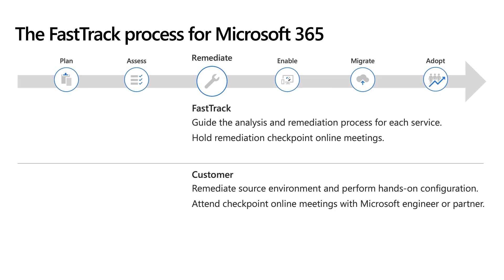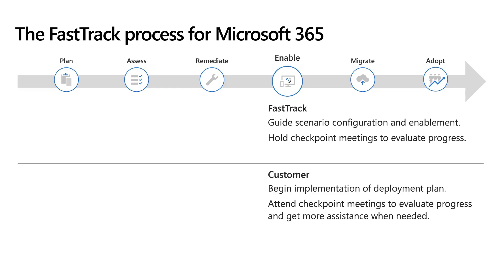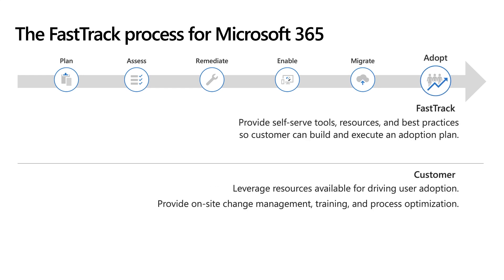During the remediation phase, FastTrack guides the analysis and remediation for each service and holds checkpoint meetings along the way, while customers remediate the source environment and perform hands-on configuration. In the enable phase, FastTrack guides scenario configuration and enablement, while customers begin implementing their deployment plan. During the migrate phase, FastTrack provides guidance to tenants with fewer than 500 licenses and performs data migrations for customers with more than 500 licenses. Throughout this process, FastTrack provides self-serve tools, resources, and best practices to help customers build and execute their adoption plan.